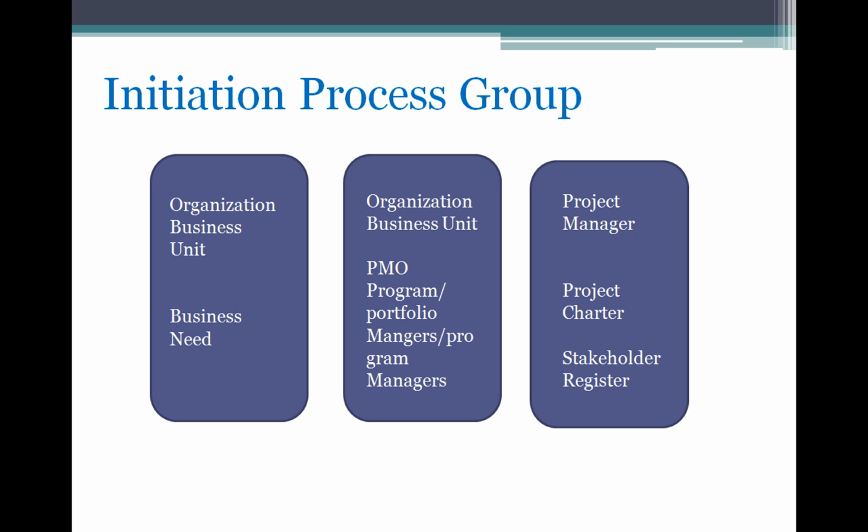Once the project charter is approved and funds are allocated, the sponsor is ready to allocate the funds, so the project manager will have a go to the project planning phase. So the project charter approval marks the end of the initiation process and the start of the project planning process.